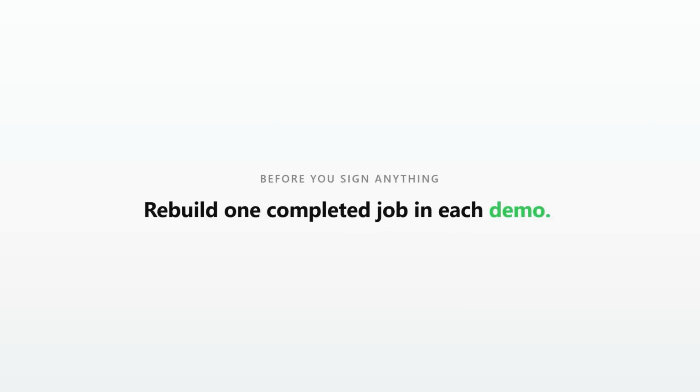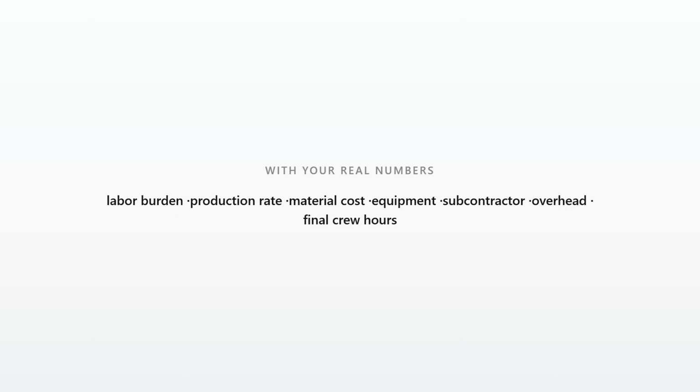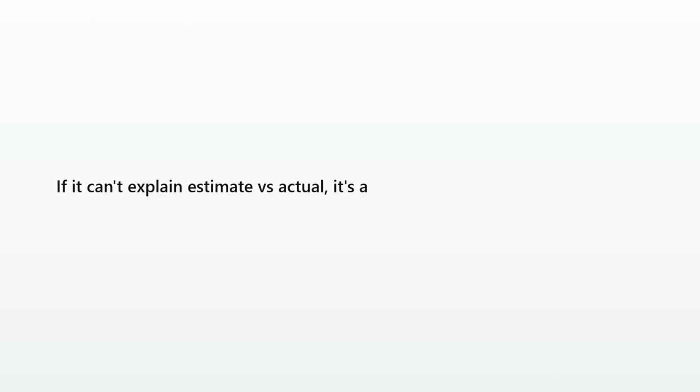Before you sign anything, rebuild one completed job in each demo with your real labor burden, production rate, material cost, subcontractor, overhead, and final crew hours. If the software cannot explain the difference between your estimate and your actual, it is a quote maker, not an estimating system.